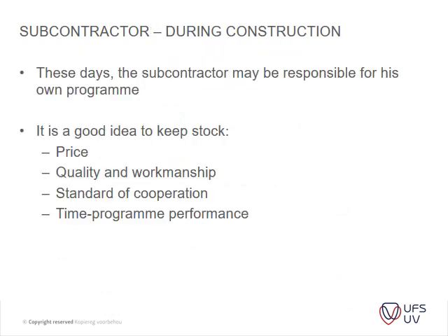Okay, subcontractors continued. These days, subcontractors may be responsible for their own program, and they are. For instance, at Amelia, where we worked, the plumbing contractors had to submit their own program, and that had to slot in underneath the main contractor's program.